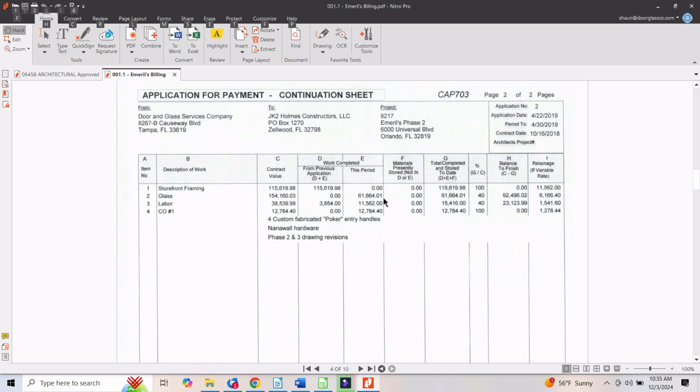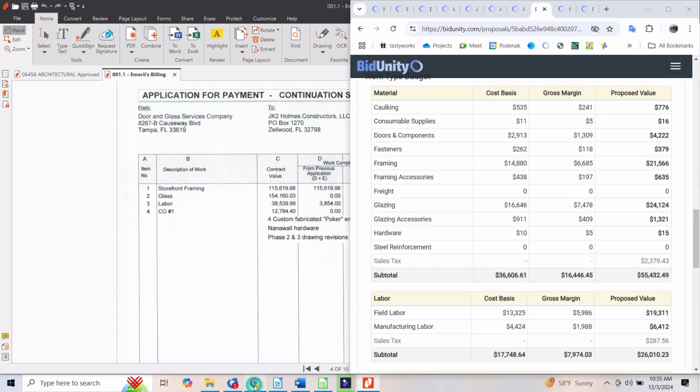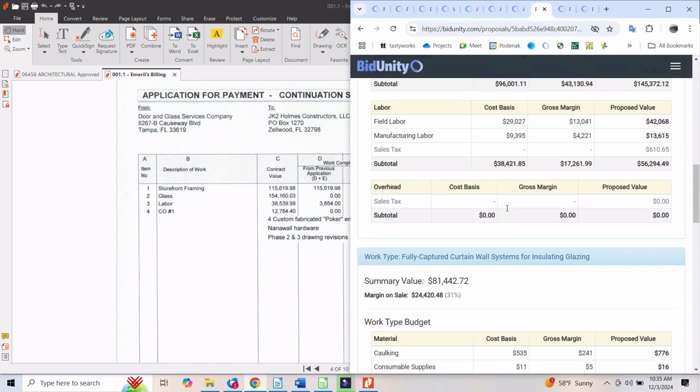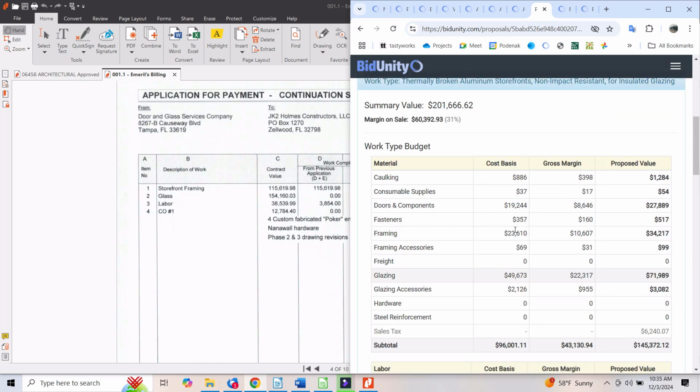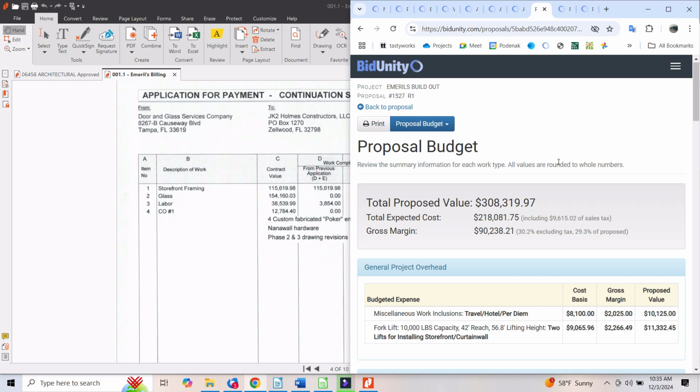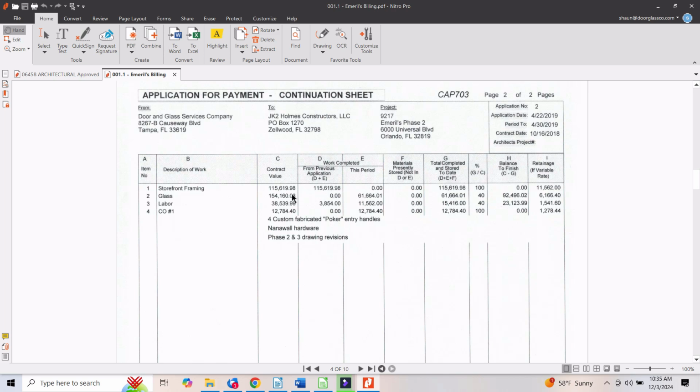$65,000 of the contract price, according to the proposal, it's 16 and 49, so that's 65,000. That's about 20% of the proposal price. Why does it show up in our schedule of values as being 50% of the contract price? Okay, that created a problem for us down the road. Somebody looking at how we put this together decided that they could breach our contract and then basically keep about $70,000 for themselves, which is what eventually happened.